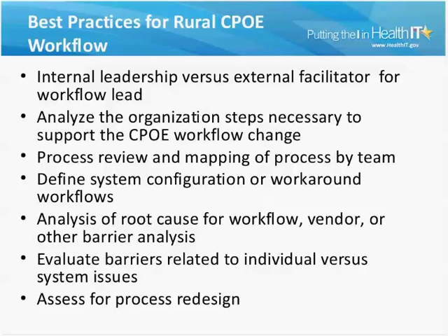Taking a look at all of those process mapping, system configuration, workaround workflows, we can actually go forward and define the system configuration, define those workaround workflows. But we have to have the process review, we have to have the gap analysis in place in order to actually define those system configurations.